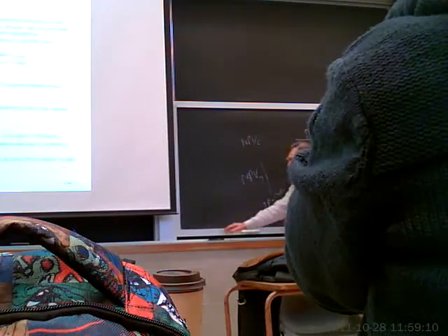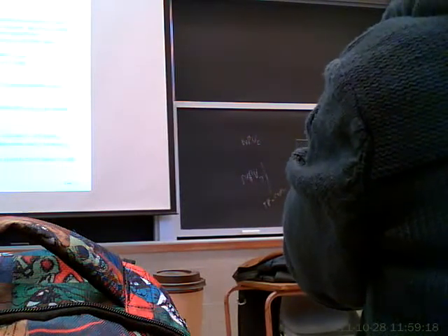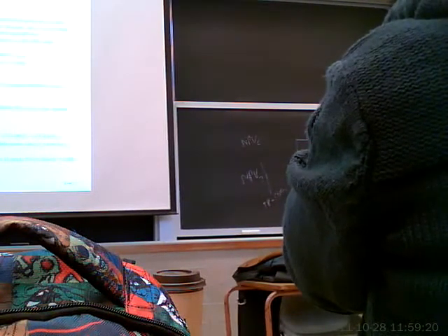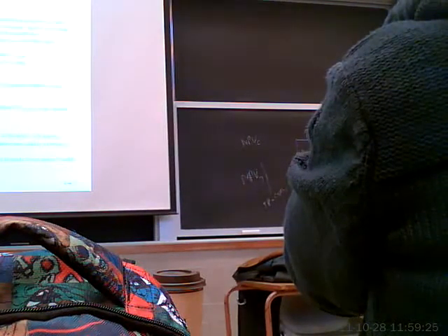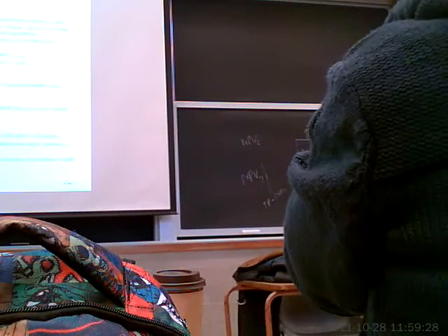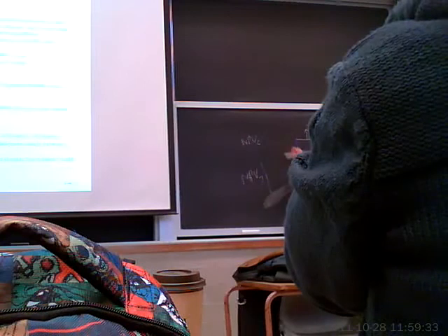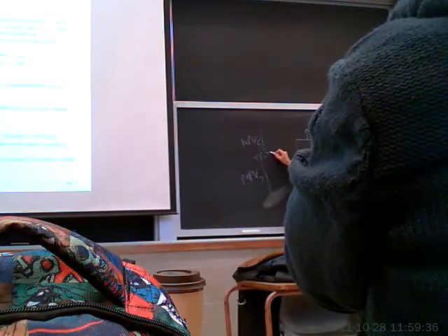Of course, the other approach is to say, this really disadvantages this option because it's got 2 useful years of life, and I can't capture everything in this salvage. It doesn't make any sense. So the alternative is to say, let's not do that, but let's start this one up again. So if I now say, time period equals 7 years, then what do I need to do? Well, I need to reinvest FC5, and I need to run it for 2 years.